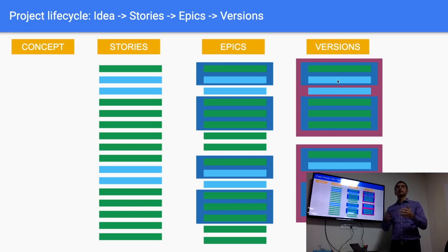But for example, if two people are working on a story, you could have the story broken down into subtasks, saying, okay, for a particular story, I need to create a method which does this, and the other person needs to create another class which does something else. So those could be subtasks. They keep getting completed, which is why subtasks are also generally not estimated. It's a story level estimate that you generally do. So that's how you can look at this.